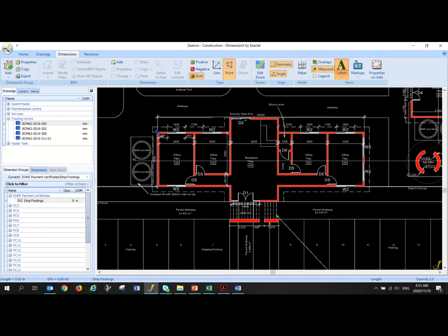So usually you've got a set of photos and some measurements that you've done. For instance, you might have the measurements of the depth of the actual excavations, the width of the actual excavations, etc. Then you can go back to the drawing and actually measure it on the drawing as well.